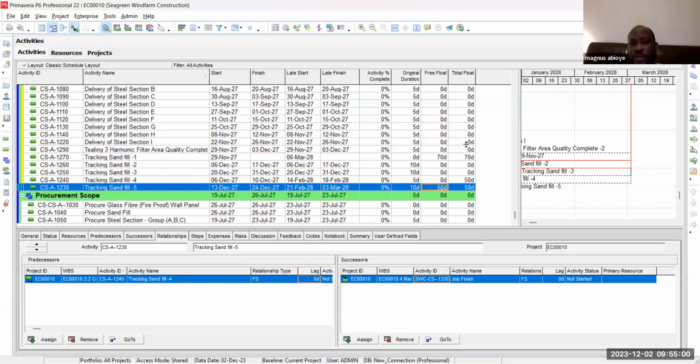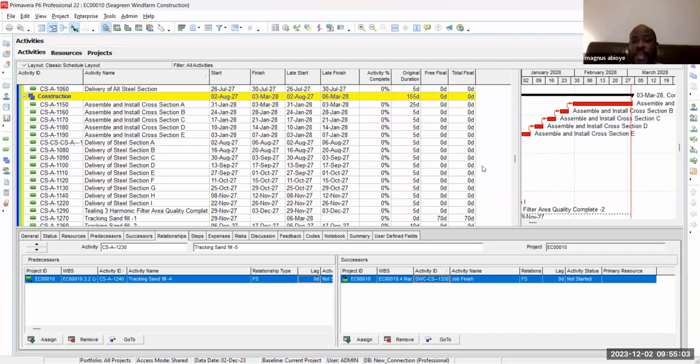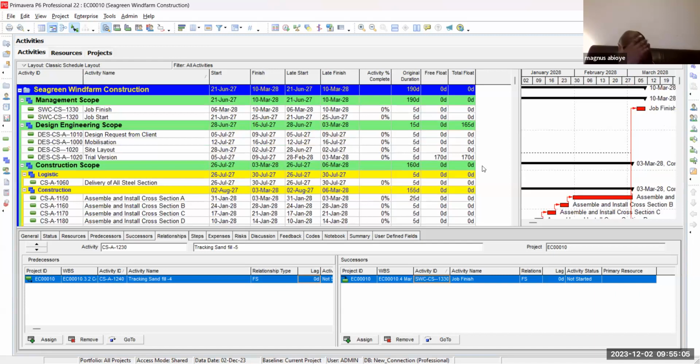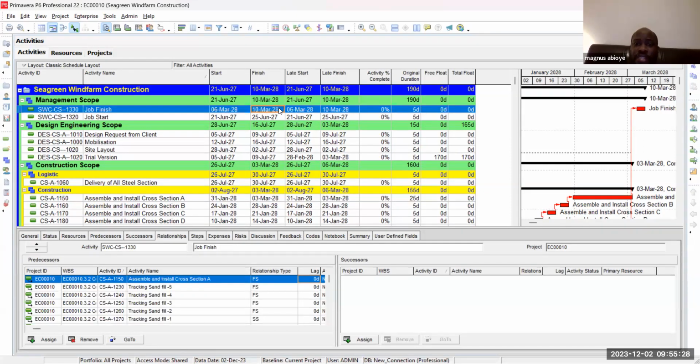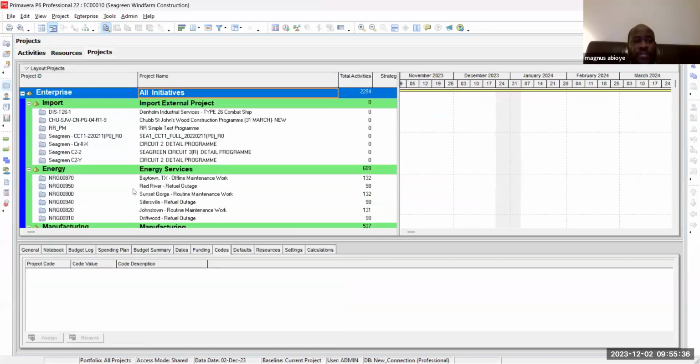But if you look at total float, it is for the whole project. And why do we need total float for the whole project? For the whole project, what that could mean is that you might have 5 days for the whole project. That after 5 days, if anything happens, your project is going to be delayed. There is more to this, but I need you to understand that there is something called free float and there's something called total float.